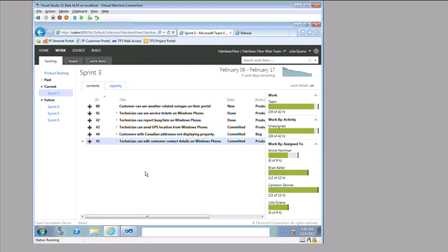You're going to choose first the number of stories you think is reasonable for your team to get done, based on the story point estimations that you've placed on them previously. And then, once you've decided what a reasonable number is, your team will work together during that sprint planning session. This is why they make them 8 hours long for a month sprint. They will work together in that sprint planning session to actually break all the stories down into the component tasks that are needed to complete the work.